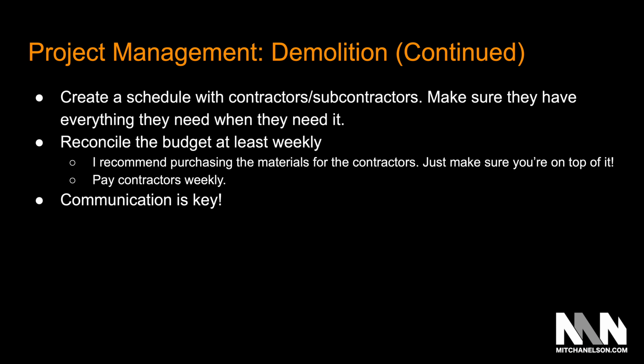Create a schedule with the contractors and the subcontractors. Make sure they have everything they need when they need it. Reconcile your budget at least weekly. Make sure that your numbers are on point. If you only reconcile your budget once at the end of a project and you're off, it's too late. But you can start to see discrepancies if you're budgeting at least weekly and you're reconciling your budget at least weekly. You can start to see discrepancies and patterns, and they're easier to correct if you're doing that on a